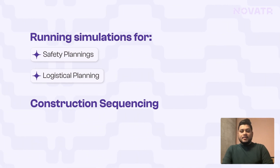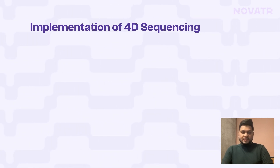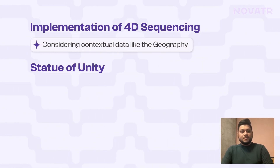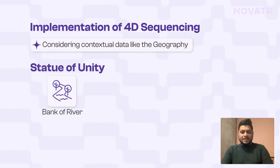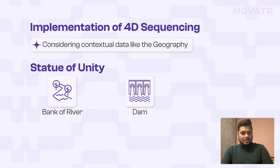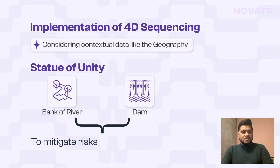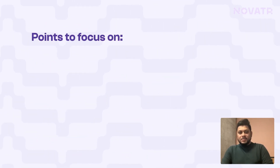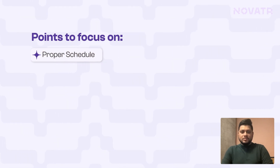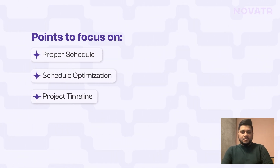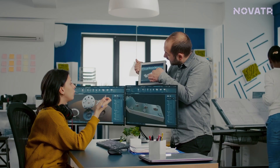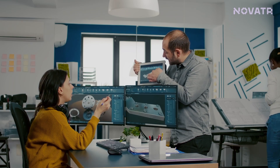Moving on to the modeling part, the BIM implementation also covered 4D sequencing. When building statues, there's contextual data to consider — the geography is not straightforward. We are actually dealing on the banks of a river with a dam associated to it, so sequencing had to ensure no risks or calamities in the future. To sync sequences with schedules and optimize timelines, 4D applications like Synchro and Navisworks were used, where sequencing was simulated and shown to project managers and executives.